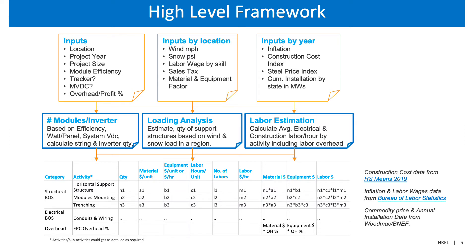We use Bureau of Labor Statistics data for the labor wages for all these activities. For commodity prices and soft costs, we usually depend on quarterly reports from third-party research firms like Wood Mackenzie or Bloomberg, and sometimes we also get data from industry interviews.